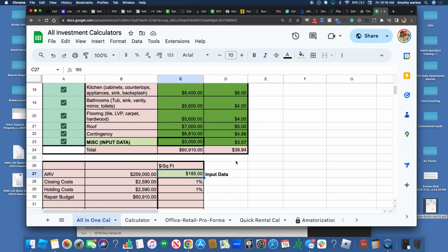It was very easy. What's the non-addition timeline typically? For a project like this, like 1,300 square feet and mostly cosmetic, I could turn around in about 3 weeks. Like 3 or 4 weeks, we could be done. Our house that we live in right now was 3,500 square feet, mostly cosmetic. We didn't have to do a roof, HVAC, any of that. And that house took 45 days, I think, less than 45 days. So we can do it. And that's just a crew of 4 or 5 people working every day.